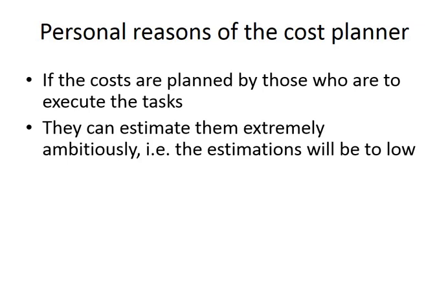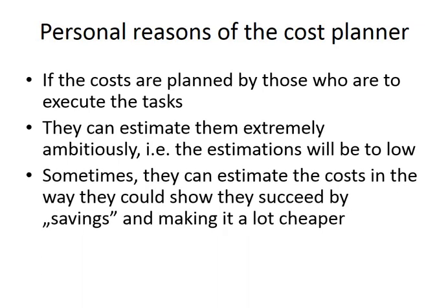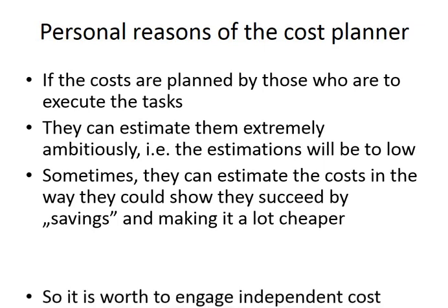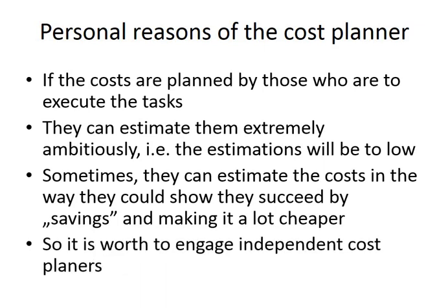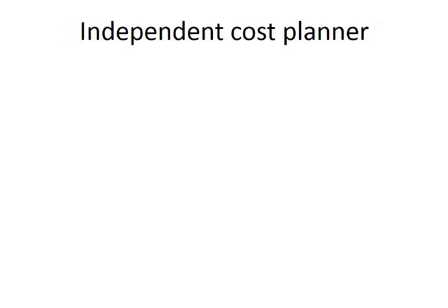So to show that they can do almost everything for nothing, or on the other hand, they can show that the costs are going to be that high, and then they are going to make those savings and show that they are the best in cutting the costs. So this is one of the reasons that an independent cost planner is a good choice in many cases.